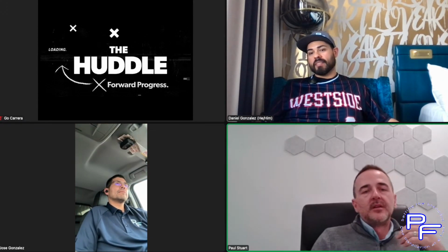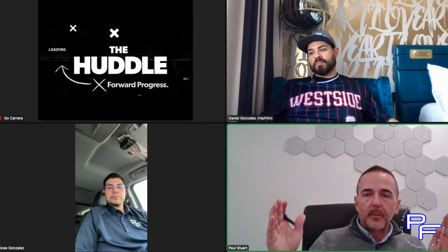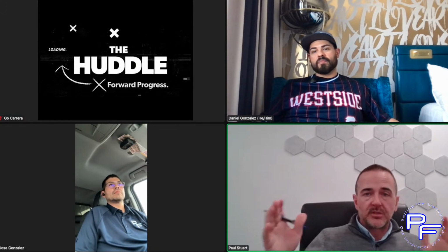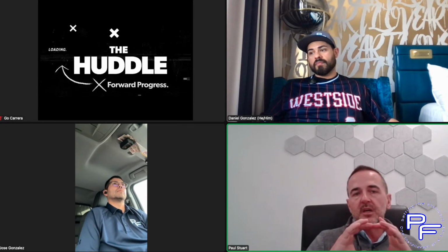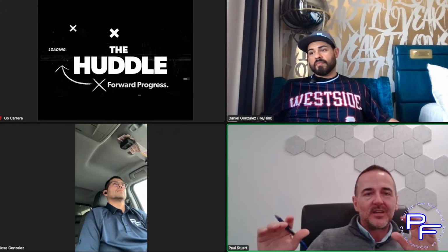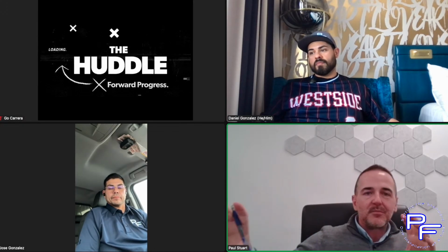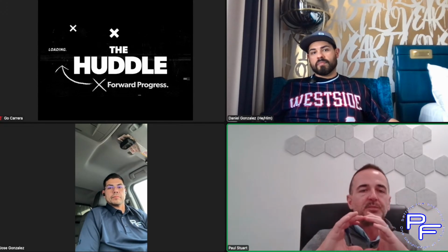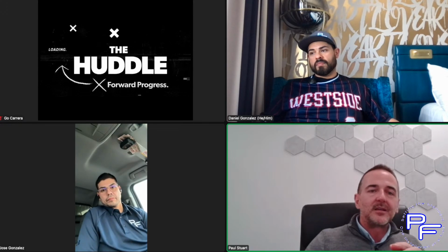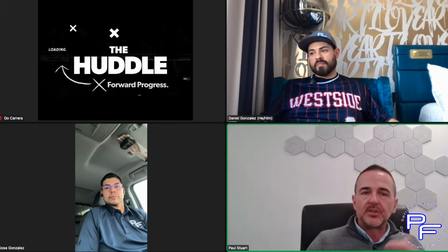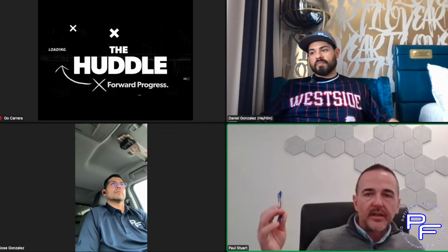Well, there's a lot out there. Again, just to recap this, proposals should be in some consistent format. Make sure you're putting in your exclusions, specifically what you're excluding. Just a little note on ours: we have job specific exclusions. We found that when we added something to our standard exclusions, it was just a word or two, and it would get overlooked because it's in the same spot as all the other bids. So we added a spot for job specific exclusions. Maybe on a remodel, we're going to specifically exclude moving, and that's where we'd put that kind of thing. Our standard exclusions are always excessive, unforeseen floor prep, and we go through all that stuff. Final cleaning, protection of floors, that kind of stuff.